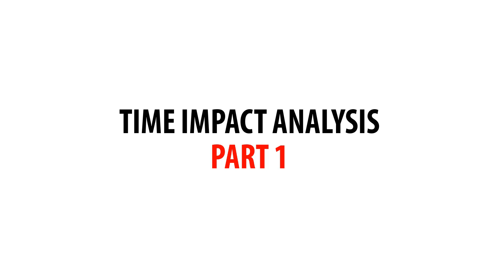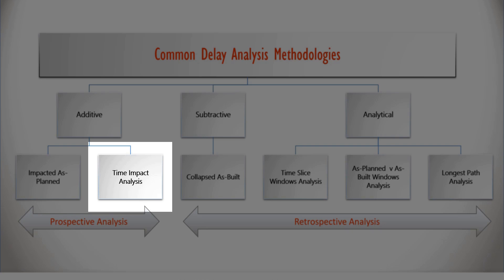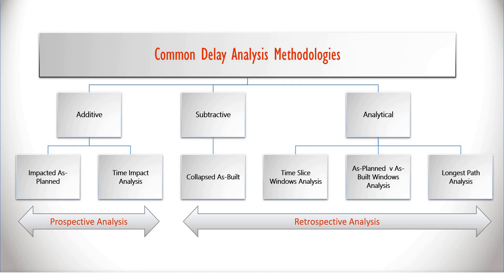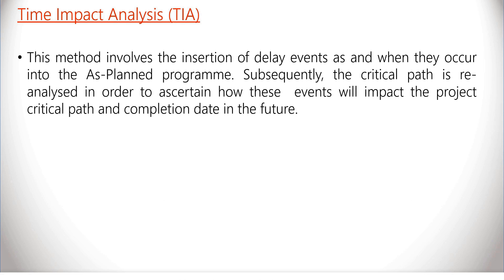In this module, I'll give you a detailed demonstration of time impact analysis. This method involves the insertion of delay events, as in when they occur, into the AS-PLAN program. Subsequently, the critical path is reanalyzed in order to ascertain how these events will impact the project critical path and completion date in the future.